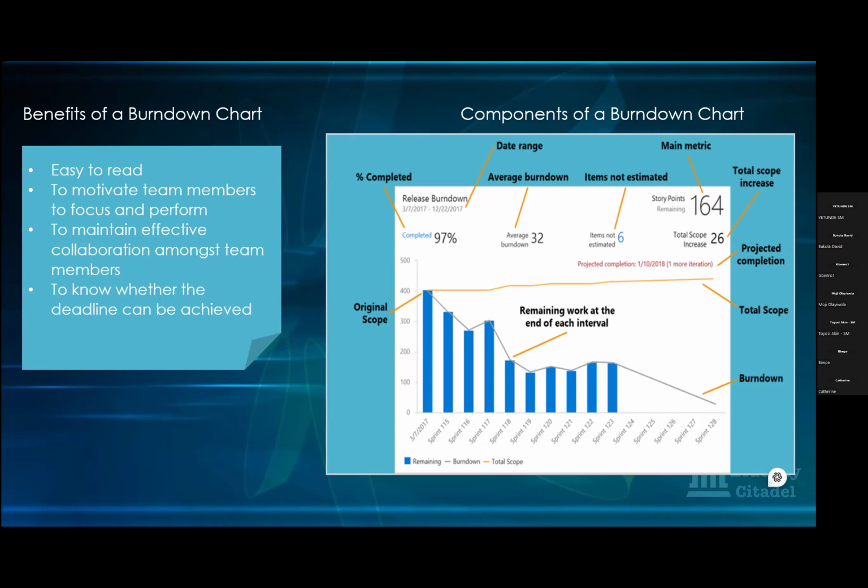Really, without the UAT? The UAT needs to be done. If you say the whole thing stops when a tester passes a story that maybe doesn't have a bug, what if at UAT, the BA, the PO, or anybody doing the UAT realizes that whatever has been done does not align with the acceptance criteria? Because you want to finish all that before it gets to the end user, the client.